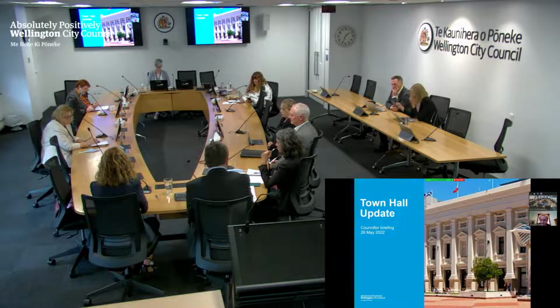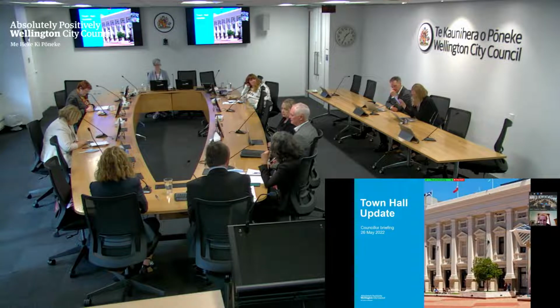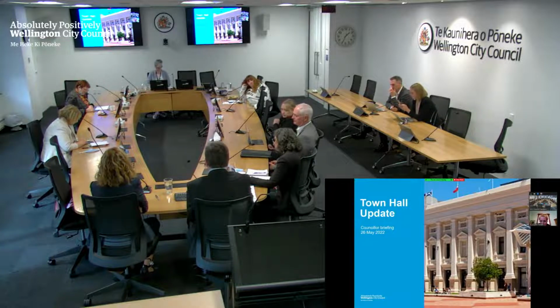Once you start opening up these old buildings, you discover all of the issues that you may not know about until you do that. So at that time, the contractor was not prepared to take on all of that risk, given the extent of those unknown factors, and the council agreed to accept those risks directly and to manage those risks.